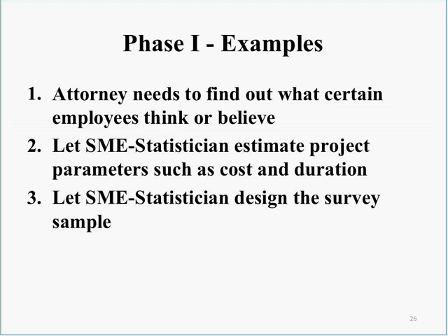Usually early on. Mistakes made early on compound themselves and multiply themselves, and later on, when it's too late, we find, to use an example from manufacturing, where I come from, that a defect caught early may cost only $10. If it's caught at the next level of manufacturing, it may cost $100. And at the next level, $1,000. The most important pitfalls are the ones that occur early, and they need to be corrected.